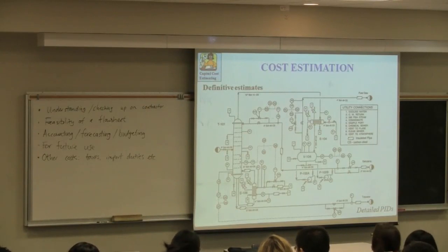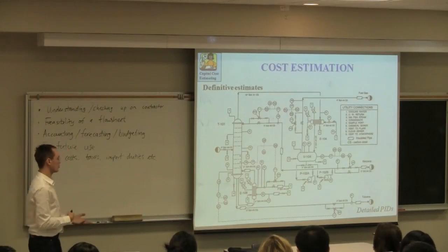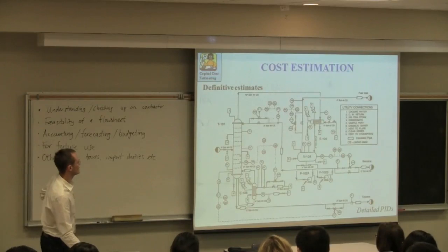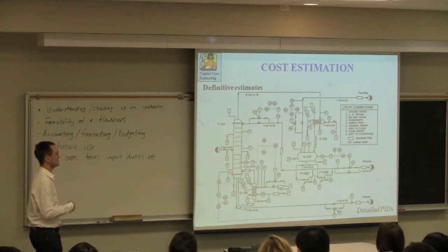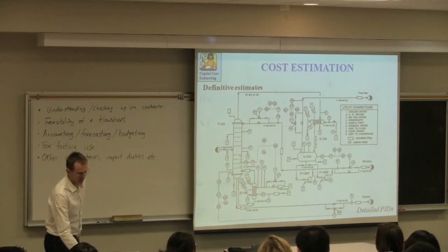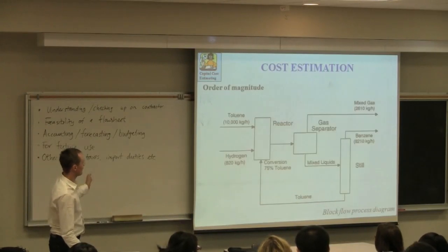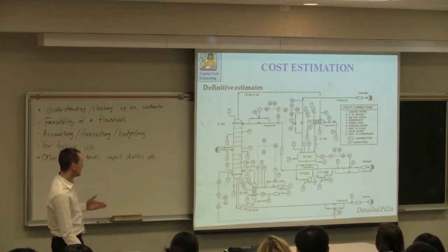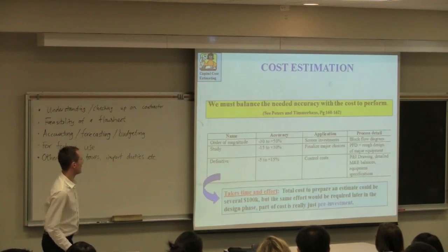It's not just produce this drawing and then go specify the costs. It's drawing, estimate the costs, iterate, fine tune, revise the drawings, hand them out to contractors. They come back with problems that they've identified, revise. And so the project budget very quickly grows as we go from this most basic flow sheet to that. And the accuracy with which we estimate the cost of each one of the units in there gets refined.